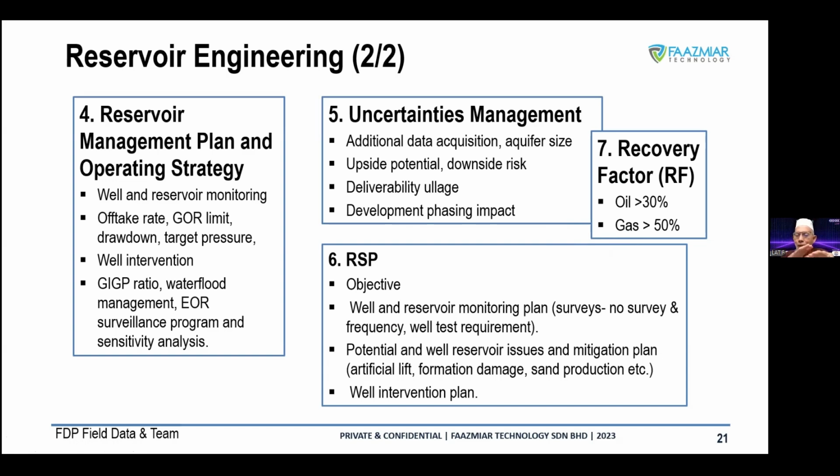So we try to come up to the break-even line, where the cost of the wells is just enough to have good economics for the recovery, because of course you can put 100 wells in one field, but the cost is going to be very high. The project cost will explode. So you might think maybe 20 wells is enough rather than 100, but still covering enough reserve and then produce. And of course, as we go along, we're going to optimize the field, understanding the potential. Then we can think about adding more wells later on.